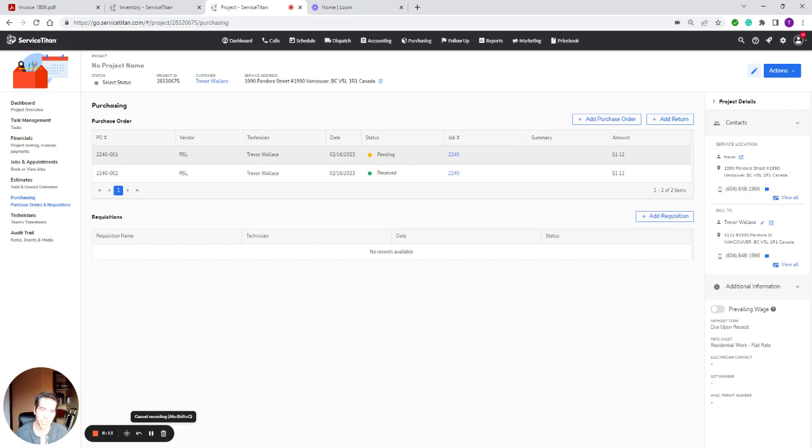It's just, we've created a purchase order that hasn't been received. This won't be calculated in your actuals. This purchase order has actually been received, so it's accounted for, we've got it. This is going to show up in your actuals. So you can look at purchase orders and the status of purchase orders in the purchasing section. So make sure that you use this to check up on things like that.